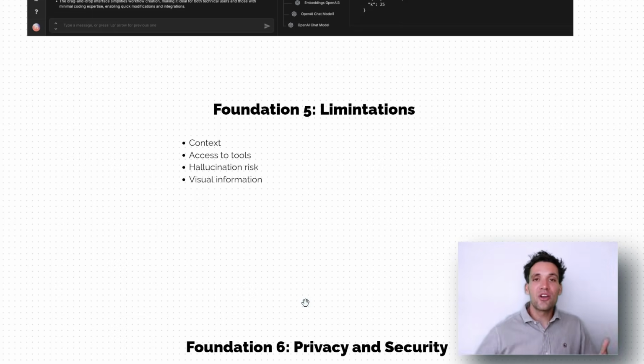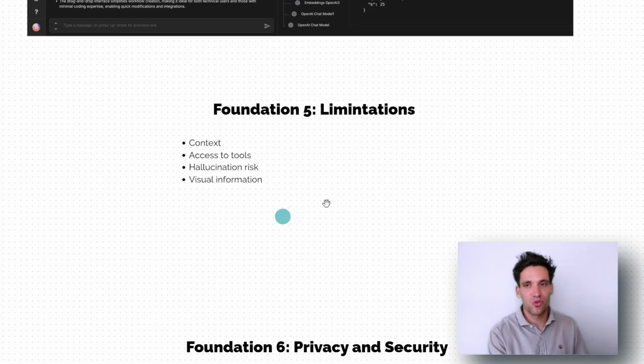So for example, I know AI can do good quantity takeoffs if it is counting something like light fittings using the text tag, but I know it will do a terrible job at measuring a conduit that goes through a wall where there's not explicit measurements on the drawing. So building an understanding of the limitations and working around those limitations.